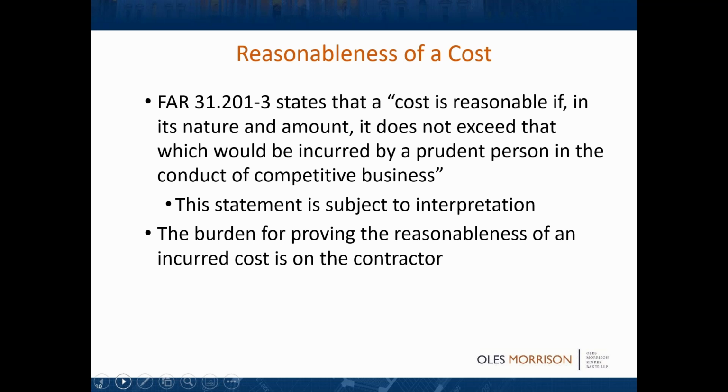To give you an example, in an REA, you as a contractor have to show that your attorney's fees that you've paid on an hourly basis to get your REA done are fair and reasonable. And what I always put in there is that the Department of Justice for 2020-21 has said that for an attorney like myself with over 30 years, a fair and reasonable hourly rate is $670 an hour. Now, I'm less than that rate. So what I always say is, the government has published, here it is in black and white, that $670 is what they'll pay as fair and reasonable for an attorney with government contracts experience over 30 years. I'm less than that. So I have my contractor say, this is clearly a reasonable cost. He's below what the government considers to be a fair hourly rate. Again, it's your burden. So pointing to things like a published rate that the government has published is certainly going to help.